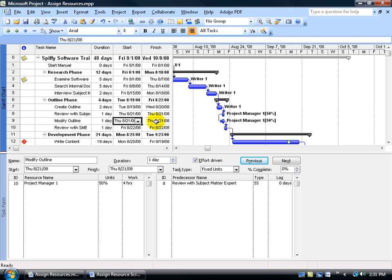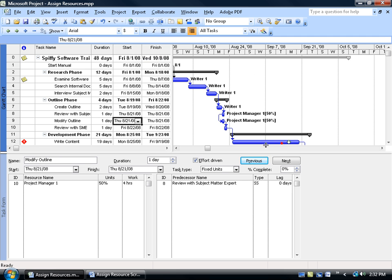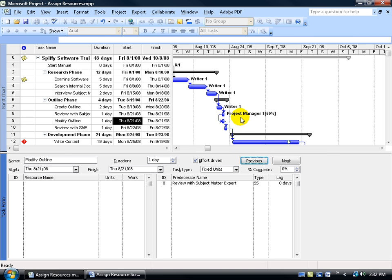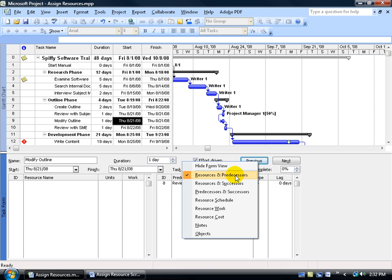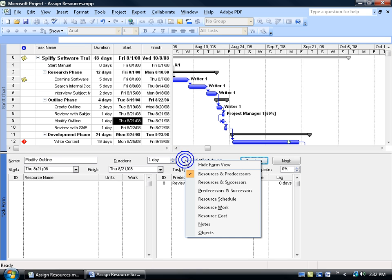Now, again, to unassign resources here, you can either come up and click on the two dudes, the resource button, select it and click remove, or go ahead and select the resource here and then delete it and then click OK and the resource is removed. As a side note, there are more views to this table down below than meets the eye. The only way to bring up additional views is to right click on the bottom resource view and go down and where there it is. The default is resource and predecessors. You can change it to resource work, costs. In any case, that's an extra side note here in case if your views change. When in doubt, right click on the view and change it back to its default resource and predecessors.